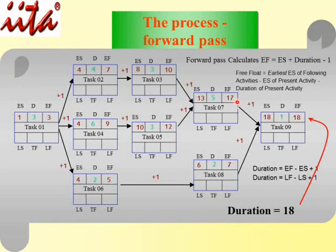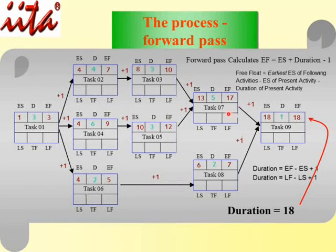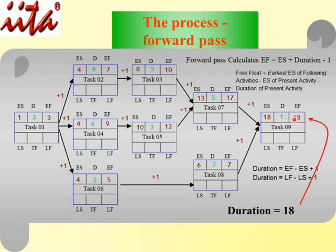This path ends at month 17, so the next task takes off on month 18. The other path ends at month 7, which would suggest starting month 8 — but since both must complete, we take the higher value of 18. Applying the formula: ES = 18, Duration = 1, so EF = 18 + 1 − 1 = 18. Therefore, the total duration of this project is 18 months.